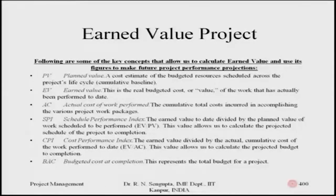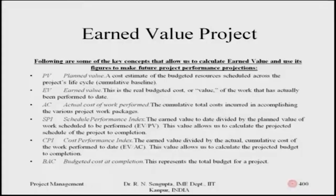The Cost Performance Index (CPI) is essentially EV divided by the actual cumulative cost of work performed to date — the second bullet point divided by the third. This value allows us to calculate the projected budget to completion. SPI and CPI are two different ratios that give an idea of how work is going theoretically versus practically, indicating the gap on which corrective actions should be based.